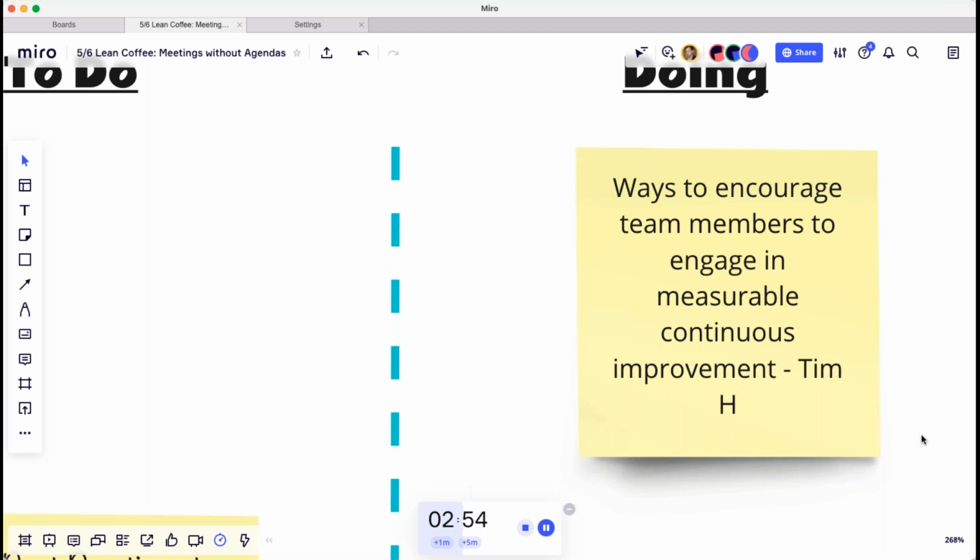So at the end of the sprint, the product owner signs off on it just like anything else to validate that they actually accomplished what they were supposed to. And if they didn't, or it didn't have the results they expected, they can go back to their retrospective, refine the idea and continue working on it. But I find it to be a very successful way of keeping the team engaged. But I'm lucky that I have an engaged product owner that's willing to do that, to help the team out.